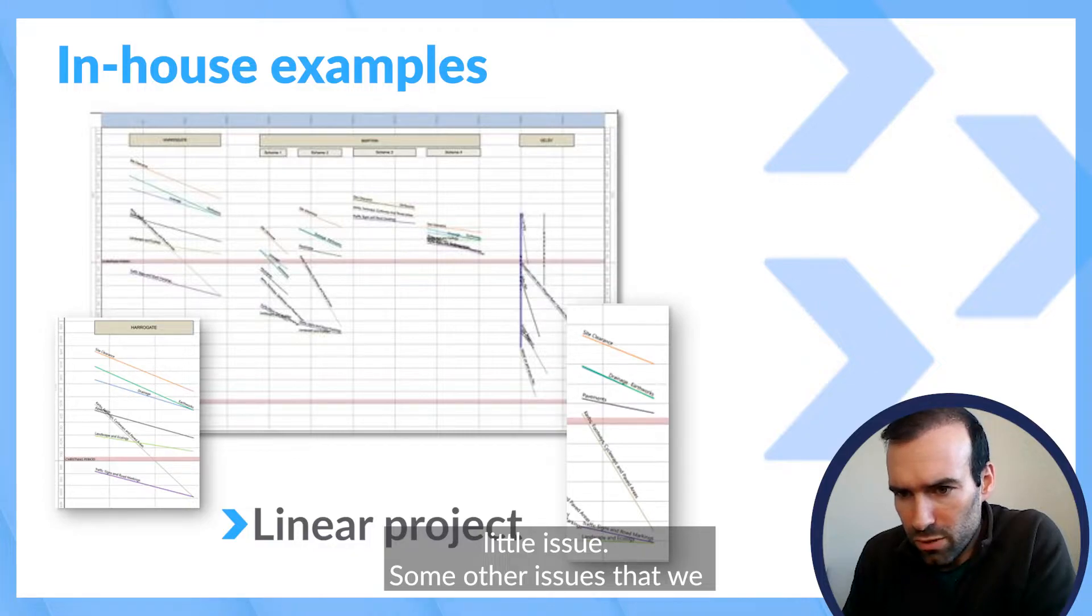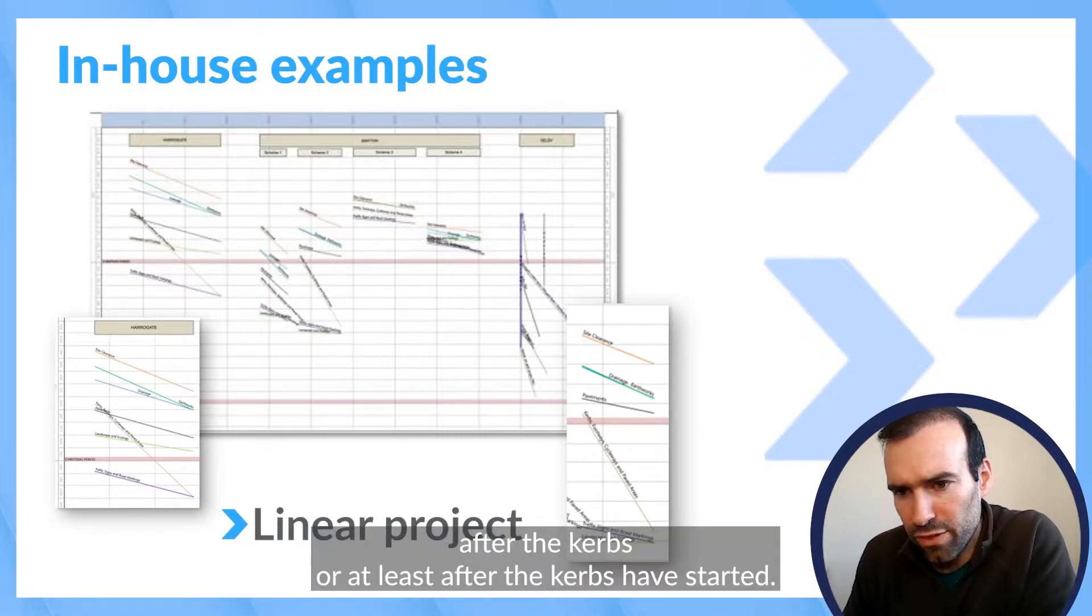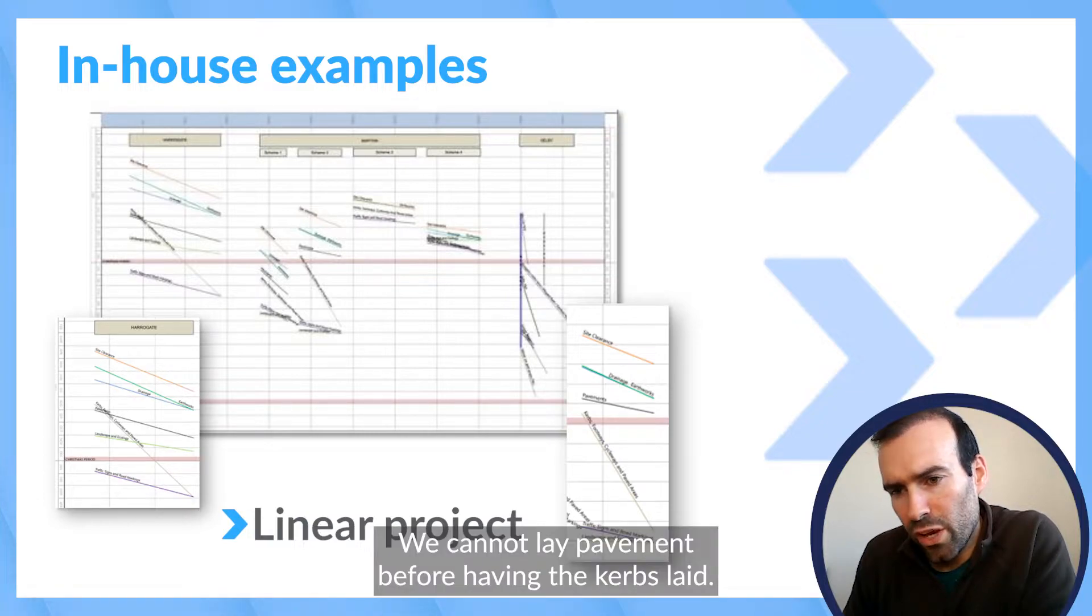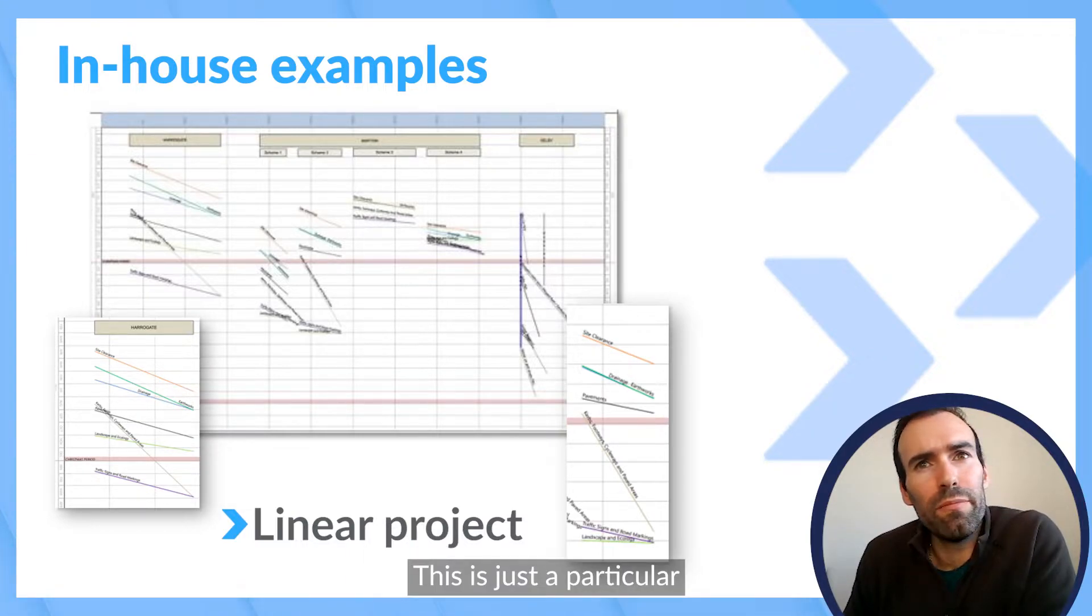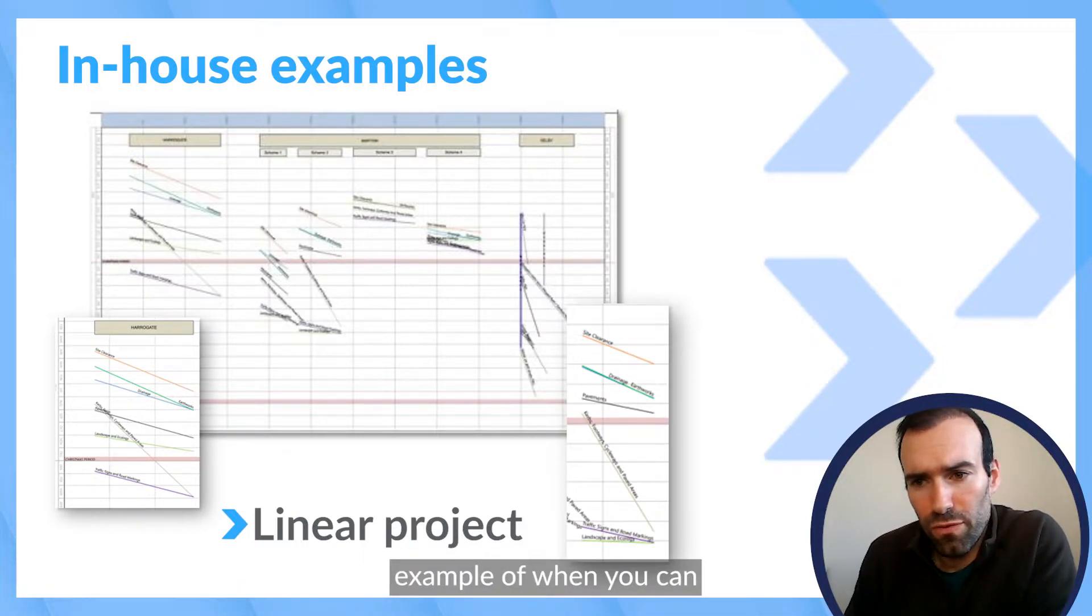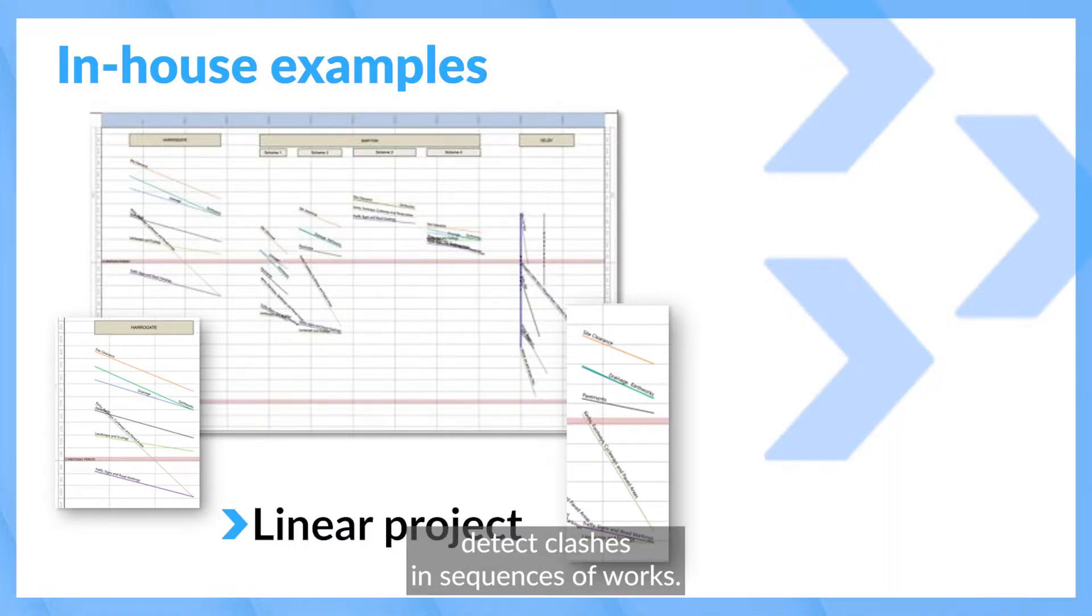Some other issues that we identified as well was that pavements have to start after the curbs, or at least after the curbs have started. We cannot lay pavement before having the curbs laid. This is just a particular example of when you can detect clashes and sequences of works.